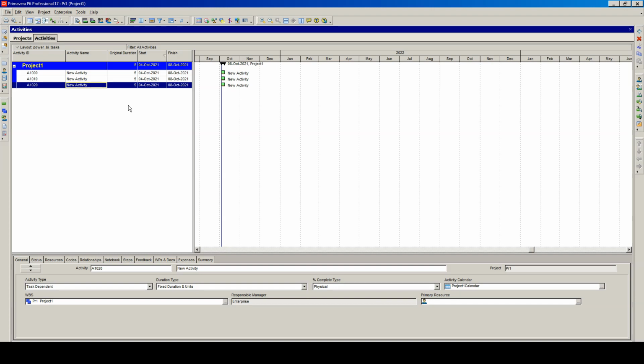Let's now make a simple schedule of the equipment which we want to deliver to the end client. We will name the first activity the contract signed. Then the second one is basic design. Next we have detailed design. I need a few more, so I just press the insert button on my keyboard.